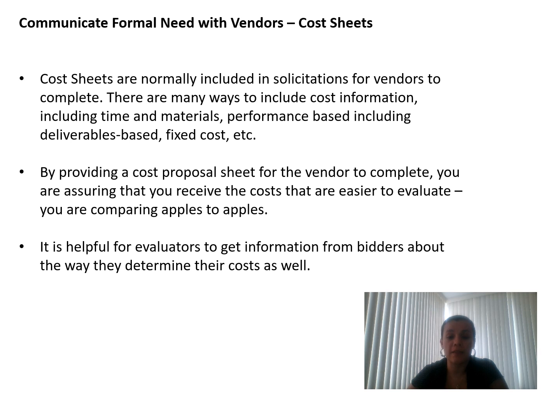By providing this to the vendor, you're assuring that you receive the costs that you need to evaluate, and you compare apples to apples, as I just told you. And it is helpful for you as evaluators to get information from bidders about the way they determine the cost as well. This is really important. It will help you to understand how much further you can go to ask for better prices or not, because you will go deep and analyze their costs and everything.